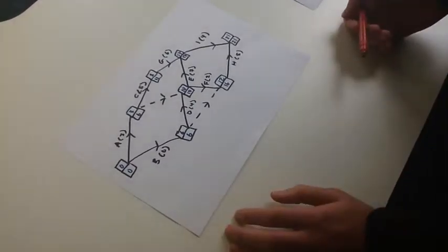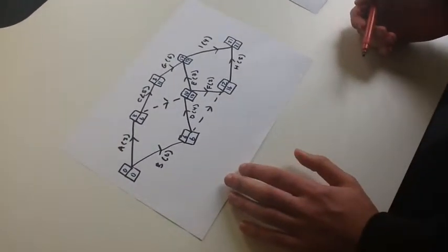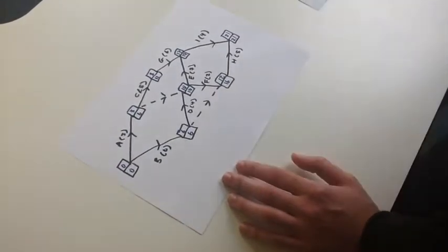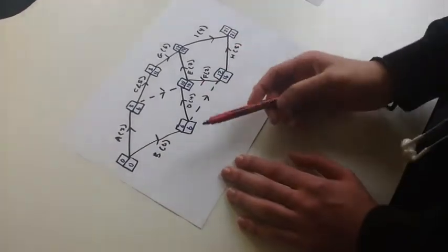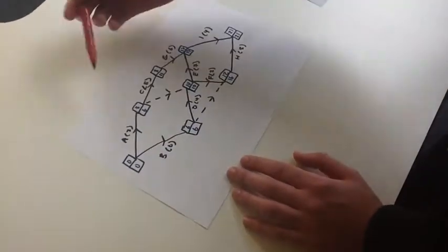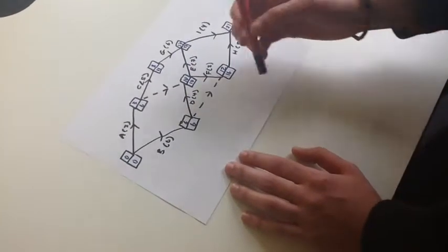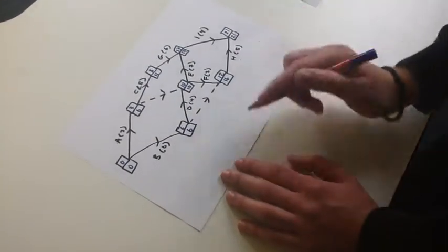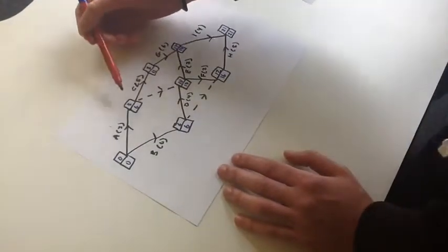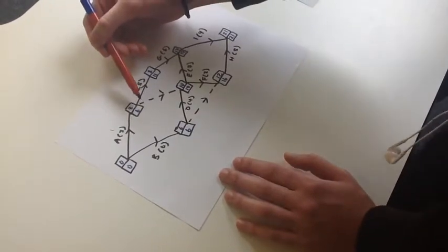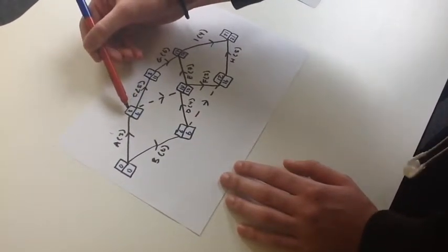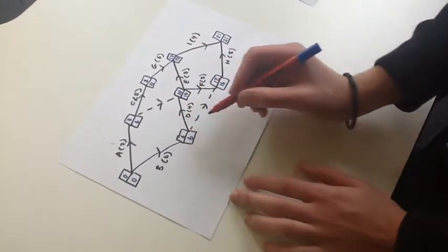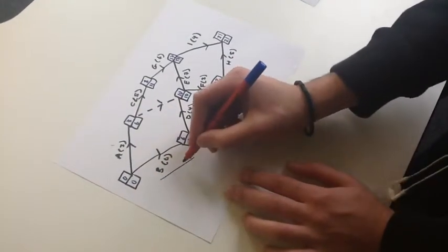A critical activity is an activity which has to be done before all the other activities, so they have to be done. So the way to work it out is, basically, you have to see, if it has no float, then it's a critical activity. It has a certain time it has to be done in. So A can be done in 6 days, but it only takes 3 days, so it's not critical, whereas B, it has to be done in 6 days and it takes 6 days. So this is a critical activity.